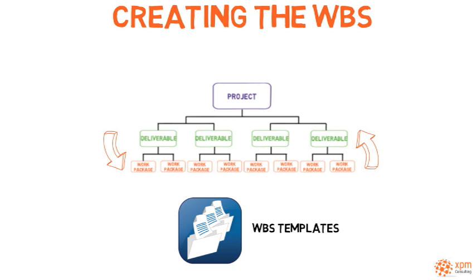The WBS is one of the planning structural elements. It will be used as a key input during activity definition, cost estimating, cost budgeting, quality planning, procurement planning, and risk identification. Unlike the scope statement, which establishes a common understanding between the team and the stakeholders, the WBS is primarily developed within the project team.